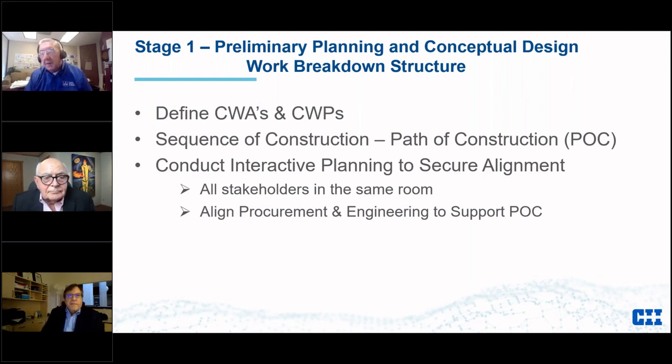Okay, I think this is a place where, again, Lean and AWP are very much in alignment, slightly different, but we're accomplishing the same things. What I didn't emphasize in my last talk was the importance of the construction guy optimizing that plot plan. I kind of skipped that a little bit. That's a very, very important step, and I'll get back to that in a minute. But in the process, he's going to define his CWAs and CWPs. We want the guy who's going to build the project defining those, not engineering, if we can.